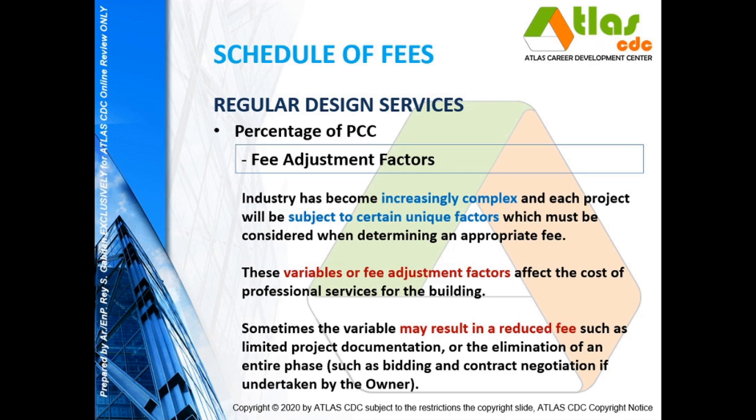These variables or fee adjustment factors can affect the cost of professional services for the building, and sometimes the variable may result in a reduced fee, so lower than the recommended, such as limited project documentation or simple documentation, or the elimination of an entire phase such as bidding and contract negotiation if that is to be undertaken by the owner.